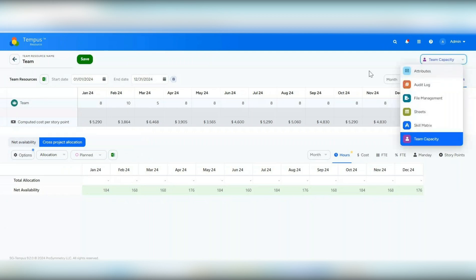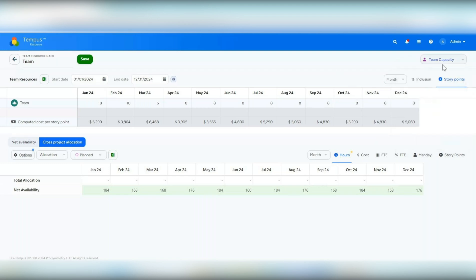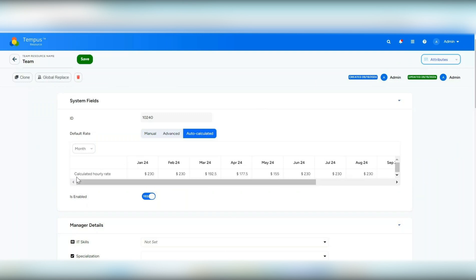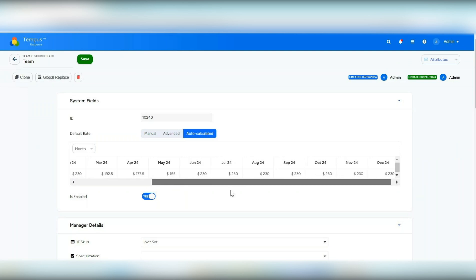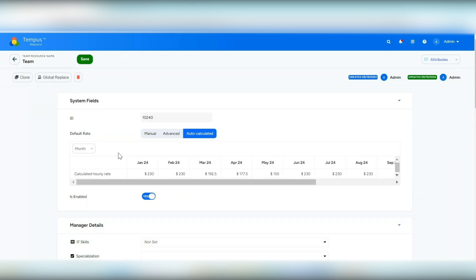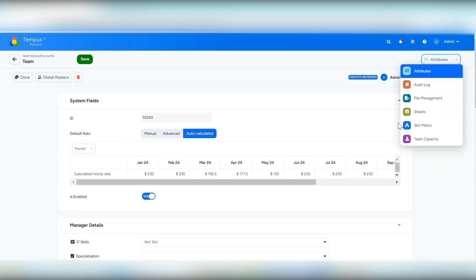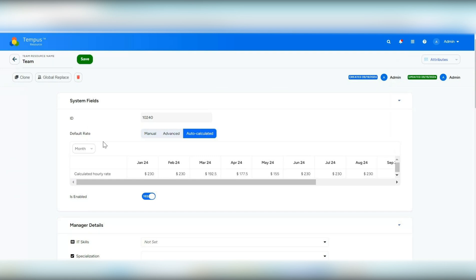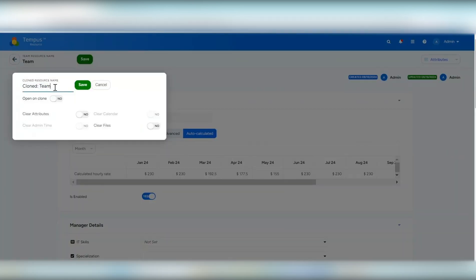Team resources also have the capability for people to view attributes, the audit log, upload associated files, and sheets and skill matrix can be associated with team resources as well. Now that I've assigned resources, you'll see a calculated hourly rate has been populated — that's new for team resources and very useful for seeing the total hourly rate information. You can also report on the members assigned to teams within PivotGrid. You can clone team resources, choosing to clear attributes or files. They don't have calendars or admin time, so those won't be available. Additionally, there is a global replace option where you can choose an effective date and assign a different team to replace that information.